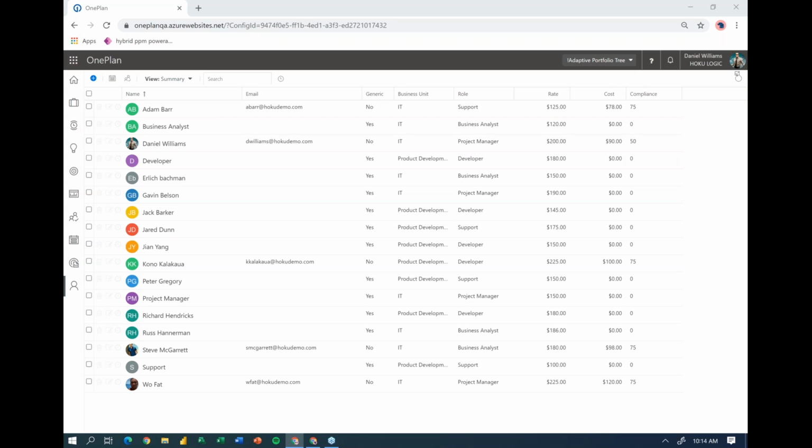There's a calculation in there called actual revenue that looks at the amount of chargeable hours you have and then multiplies it by the rate table to give you the actual revenue based off of the new rate tables, if you are utilizing them. So that calculation was updated to work with the new rate tables in this release as well.